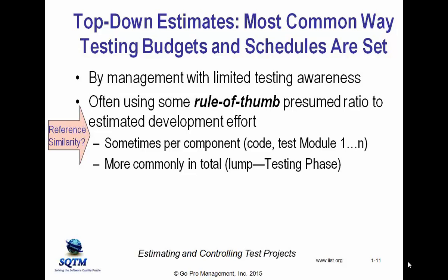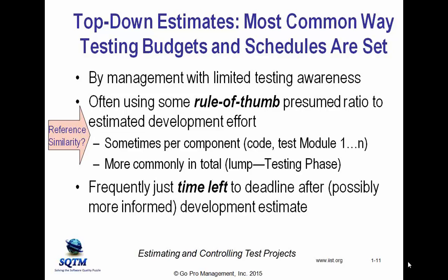Yes, the more that's developed, the more testing there's going to need to be. The more complicated the development is, hopefully the more testing there will need to be. But the fact is that development effort is not a very reliable basis for estimating needed testing effort.